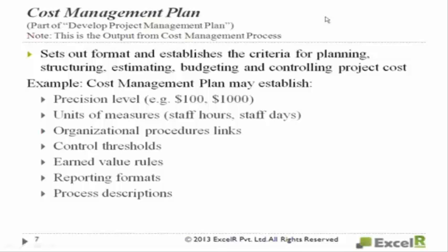So you decided that if they overspent by 5%, then I will pitch in and try to control, and the control measures should be in place. Till that time, it's okay. It's fine. So you will decide when you pitch in. It can be 5%, 10% or 20%. When should I pitch in and start controlling the costs?